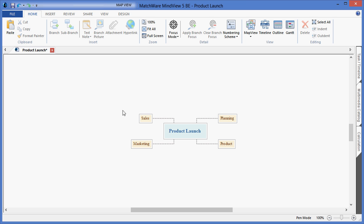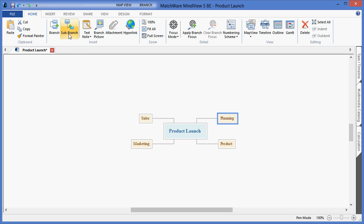These first level items within the mind map are considered the deliverable stages. To create corresponding tasks for each deliverable, I would select the desired deliverable and choose the sub-branch icon or hit the Insert key on my keyboard.